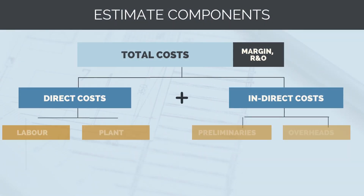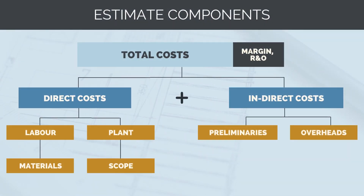Before we look at the specific steps, let's look at the components of a cost estimate. Understanding these components and how they fit together will make the process clearer. First, we have direct costs — construction costs directly associated with completing portions of the project scope. For example, if we were building a bridge, these are the costs for building the foundations, standing the structural steel, and putting in the guardrail. Direct costs are always associated with on-site physical construction works and are made up of four key components: labor, material, plant and equipment, and subcontract costs.